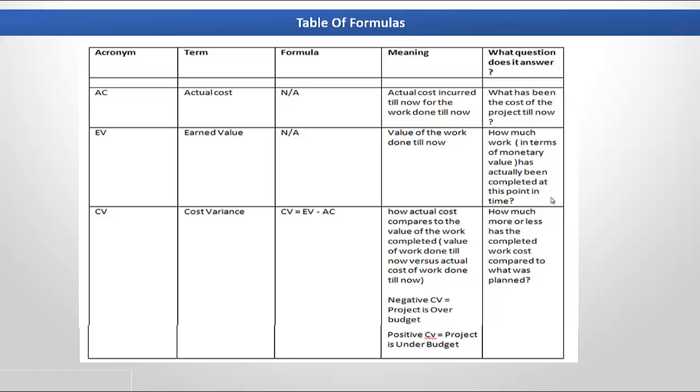Now let's learn about what question the term earned value answers. So for example, if someone was to ask how much work in terms of monetary value has actually been completed at this point in time on the project, earned value would be able to tell you what is the monetary value of the work which has actually been completed on the project at this particular point in time.